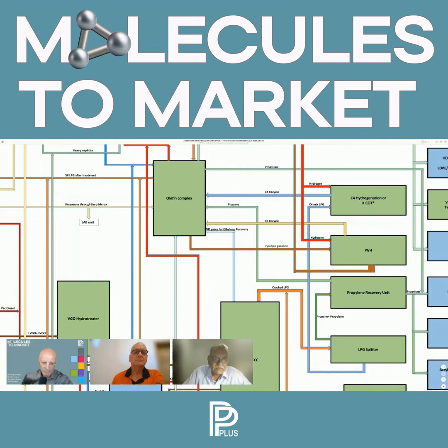But 2010 onwards, we began to look also at EPC mode of implementation. So there was a combination. We used to have EPCM with some substantial part and some component of EPC also in the project, maybe the smaller unit. So our criteria was that whatever is the controlling path or schedule controlling unit, that we should implement on EPCM basis.